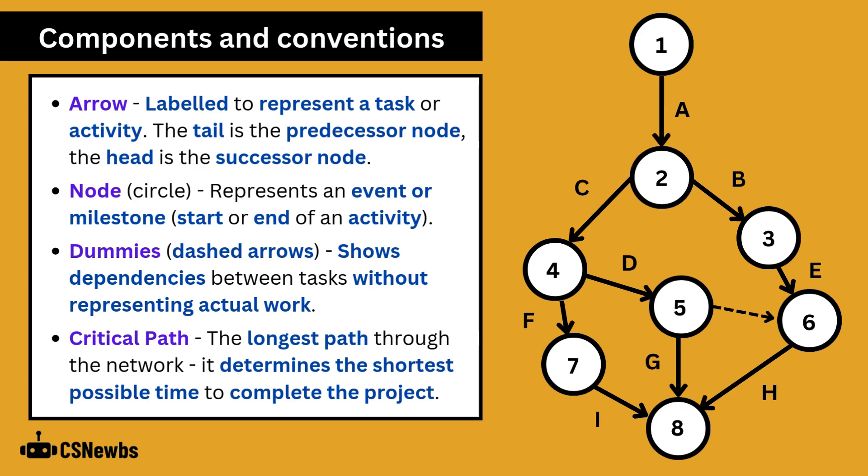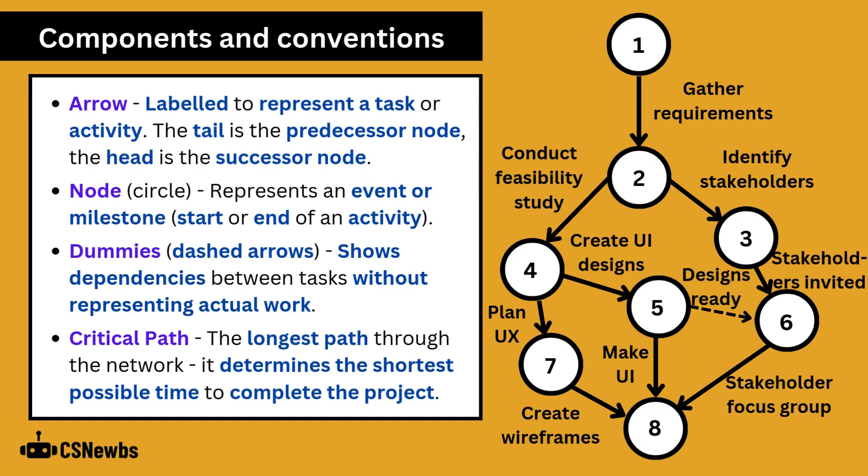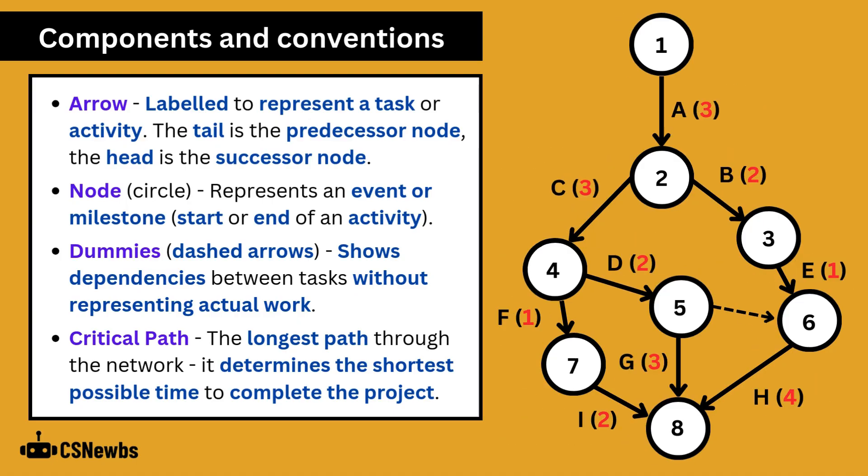Not all versions of arrow diagrams will have the duration. It may just say A, as here, or the arrows may be labelled with the actual activity, such as gather requirements, like here. If durations are included in the diagram it needs to be noted somewhere what they represent, such as three hours or three days or three weeks.